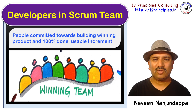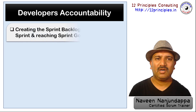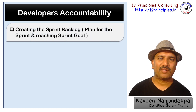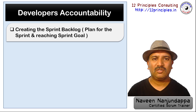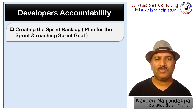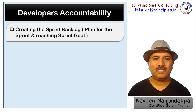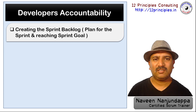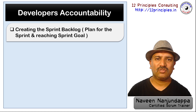Let's look at what are their accountabilities. The developers' accountability as per Scrum includes creating the sprint backlog. The sprint backlog is the plan to reach the goal, that is the sprint goal, and also helps how the team can inspect and adapt during the sprint. The sprint backlog guides the team to inspect and adapt and see where their plans can change, keeping the focus on the goal.